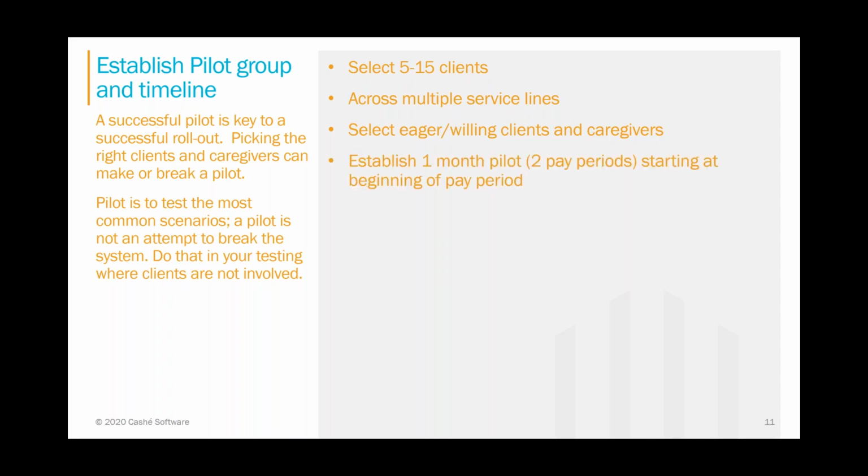We believe a 1-month pilot, which is about 2 pay periods, starting at the beginning of a pay period, would give you the experience and the necessary validation so that you can say that you've got a successful pilot, and then tweak your systems as well as processes to be able to work when you start doing the phased rollout to the rest of the clients.